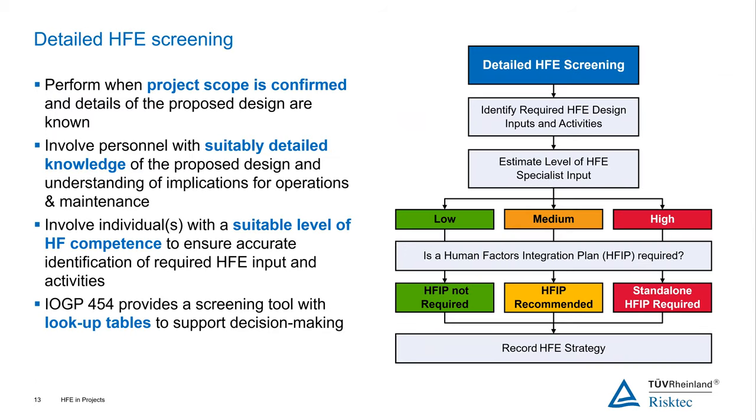A bit later in the project, so you've said to yourself, we do need the HFE input. A bit later in the project, when you have the project scope confirmed and you know a bit more about the design details, then we suggest you would carry out a more detailed screening. And so for doing this, you need to involve some people that have a suitably detailed knowledge of the design that you're proposing to do and the changes that you're making. And also a knowledge of how you're going to operate or maintain the equipment or the plant as well.